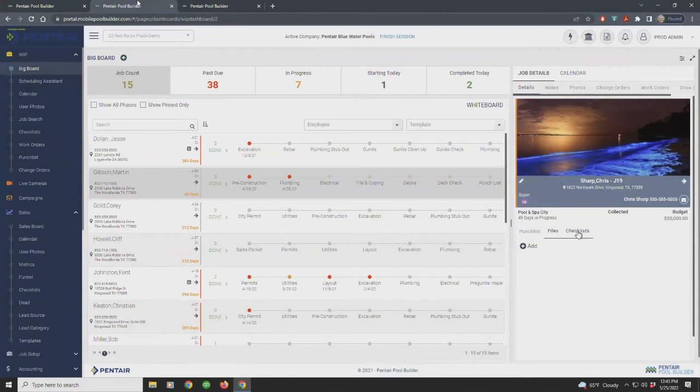One of the things the customer can do, if they download and participate on the app, is this. As I did when I would get home, I'd go in, not necessarily to inspect, but just to see what cool things the builder has done, what kind of progress. And ultimately I would see, oh, we got a busted tile here. So I would text him, hey Brian, we got a busted tile here. So what we wanted to do is start recording that information. Now the customer can submit an issue, it becomes a punch list item, and now it's trackable. So if the builder or the superintendent loses their phone, we don't lose sight of the issue that was reported.